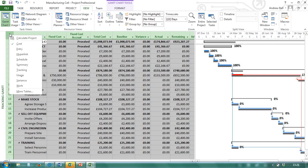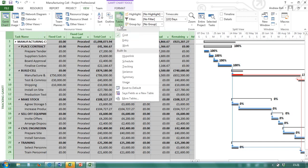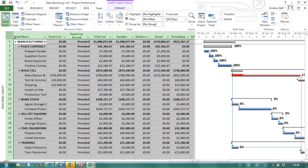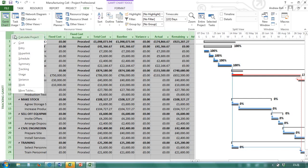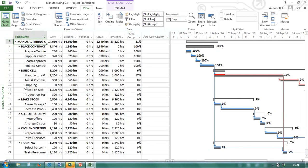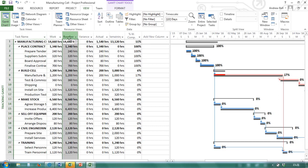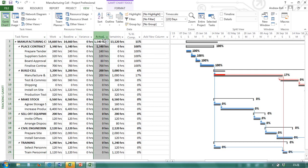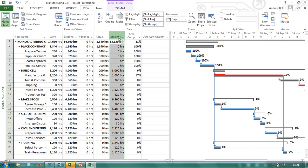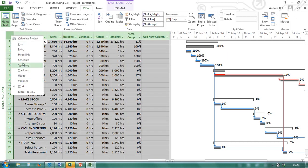Let's have a look at another table. Now here's a shortcut for tables. Instead of clicking the view tab and table and finding some of the tables, I can actually right click in that little area up here and I can jump to other tables. A common table would be the work table. This is telling me how much effort is associated with these tasks. Baseline so I can see the current plan, the baseline, the actual, the difference and the remaining. All of this is information in the database. Have a play around and have a look at what other tables you can see.